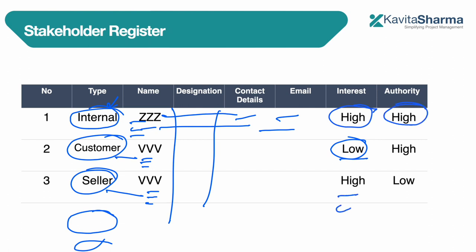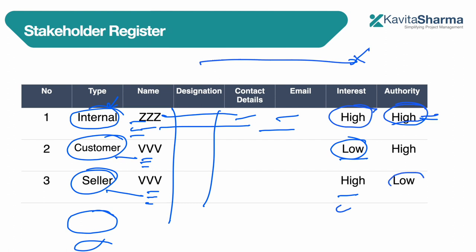Can the stakeholder close the project? Some stakeholders have the authority to close your project. For a highway project, if an authority like NTRO becomes angry, they can stop your project. Authority means: can they stop my project? If yes, authority is high; if they can't do anything, authority is low. We record this information in the stakeholder register.